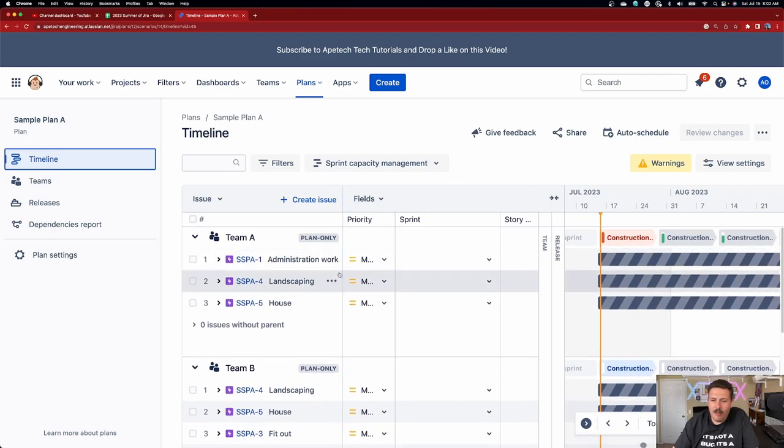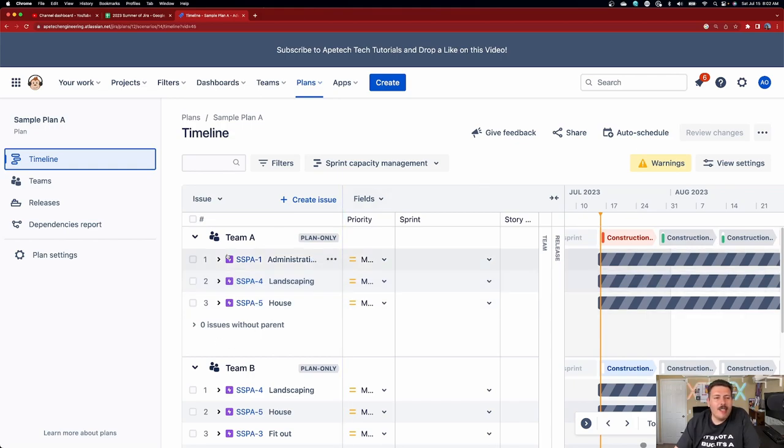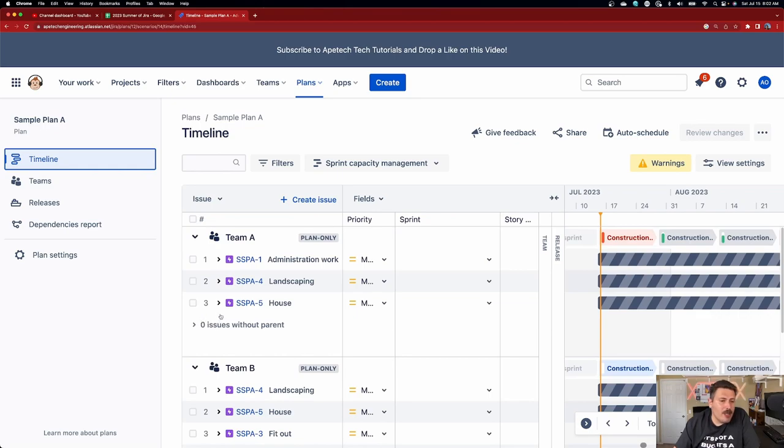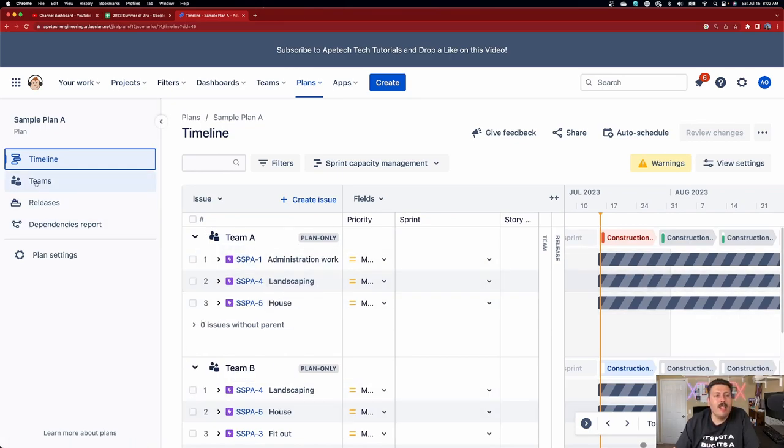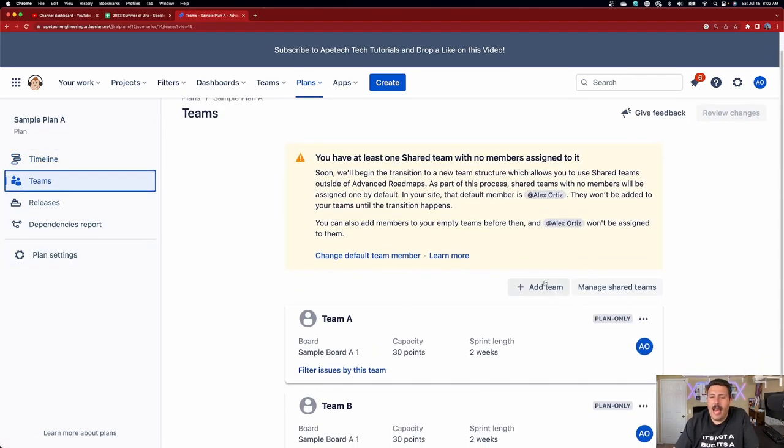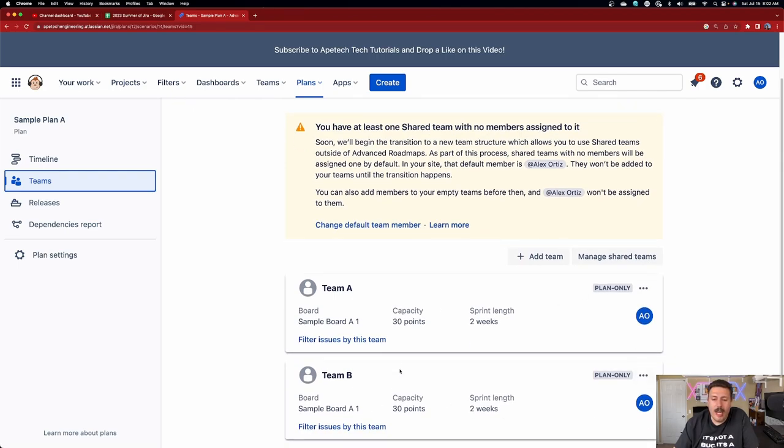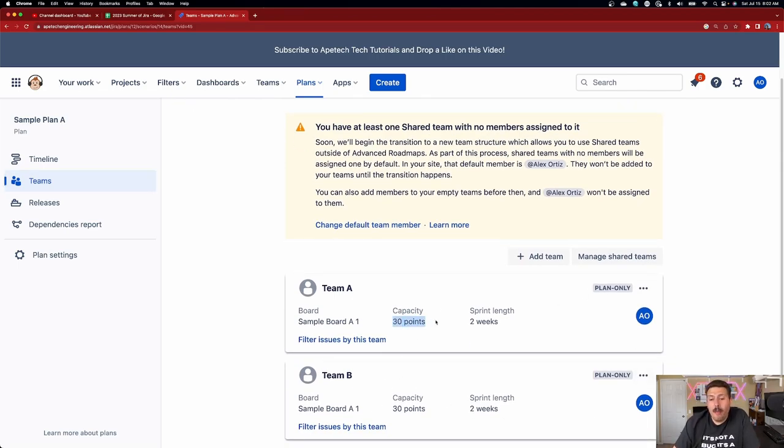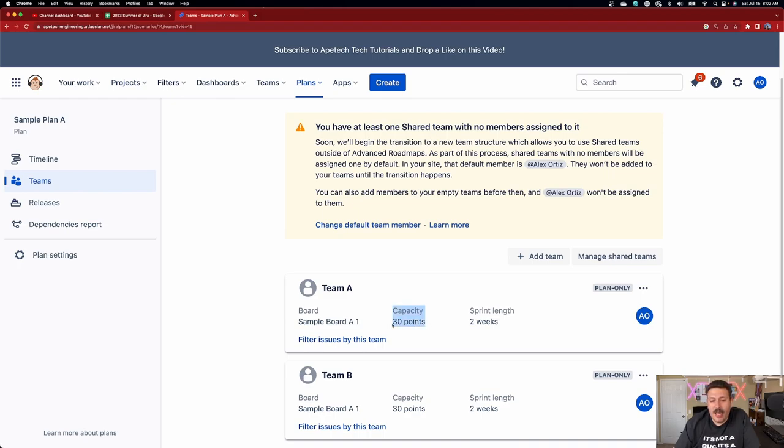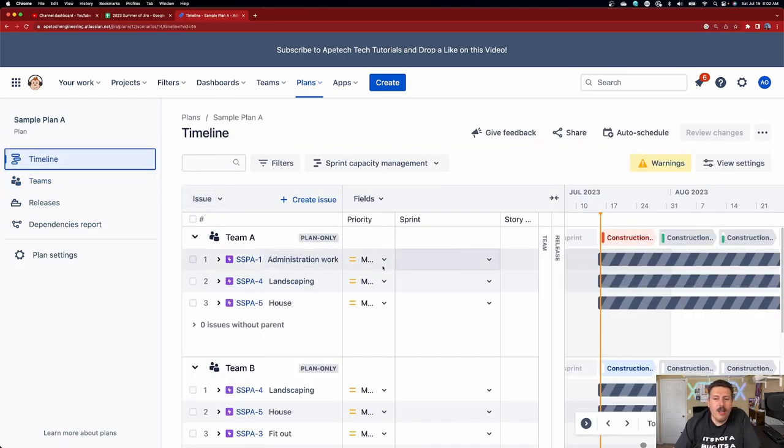First time I'm seeing this for the very, very first time. Never used this before. Kind of curious how they kind of structure the things. But immediately the first thing that catches my attention is that they break things up by team. And so that's a really good way of looking at things. And if you have questions about, well, how do they come up with these teams? Well, there's a team section over here in the navigation. You can click on there and you can add teams and manage your shared team. So that's how you're going to do that. And as you can see here, this is where you can manage your capacity. So this is a great way if you've ever struggled with capacity planning in Jira, you're going to want to use the advanced roadmap so you can assign your team points and then be able to take advantage of them in the timeline.